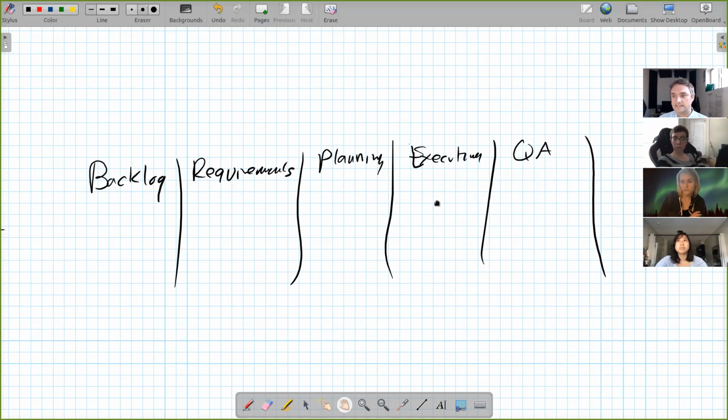Now, what you might see in this process is, oh man, we are doing an awful lot of planning and we can plan stuff super fast. We can't execute super fast though. So now we're generating a ton of inventory. And planning is the worst one to have inventory on. Because if the distance between planning something and executing something is high, the chance that that plan no longer applies exponentially ratchets up as time goes on.